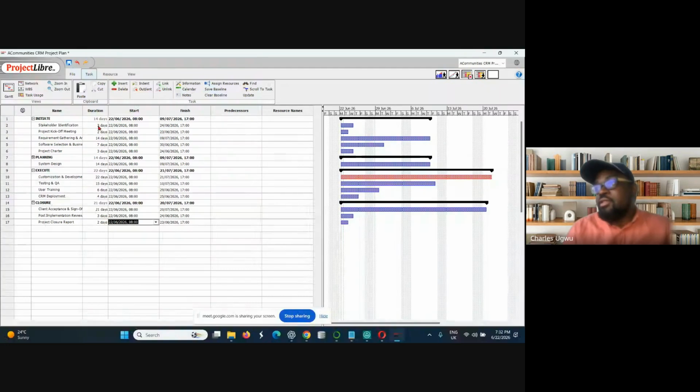What does that mean? Let's say we just have 60 days minus 4 days. How many days do we have? 4 days is a weekend. So 56 days. But looking at what we have here already, it seems we're already overshooting our duration. True or false?